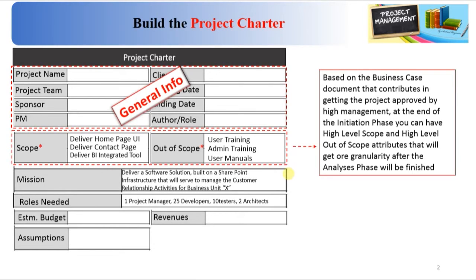Every project has assumptions. Let's take some. Assumptions are very important because they list things that we consider to be true, but have to remember to check with the customer. For example, if we are delivering a software solution, we might presume that the hardware installed at our customer site will satisfy the needs of our software solution.